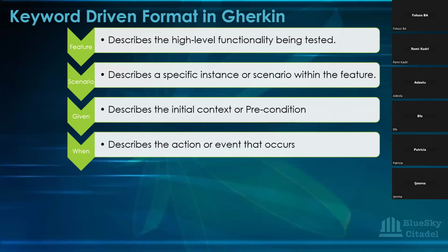So remember, within the user story, as a user, I want to is the action, so that is the benefit. Within the Gherkin syntax now, your when is your action word. So these things are actually related. You look at your user stories, I want to, that second line is the one that is describing your action. So when you're writing your Gherkin syntax, when you come to your acceptance criteria, your when describes the action that should occur, and that action should sync with your I want to within your user story. Does that make sense?